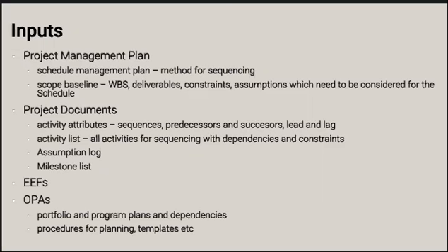So an example would be if you have some activities that are related to a regulation, you may have a resource that has to undergo 20-hour safety training, and then the sequencing would need something like certification with a finish to start relationship to regulations. So you have to finish the certified safety training before you can be certified through the regulation.